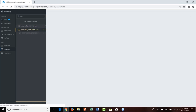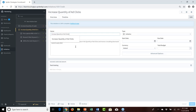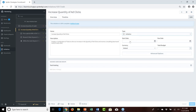The second initiative — increase quantity of ad clicks — was set up with a name and description noting we'd employ a combination of tasks. Notably, this initiative itself was not given a start date, due date, or budget, because we knew those would be fed up from underlying tasks. It was also assigned to Pete Keating.